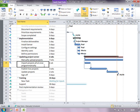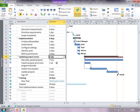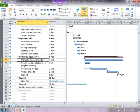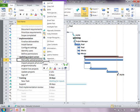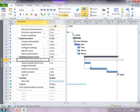Also the overall summary task duration is six weeks. If I go with manual update it is going to take seven weeks. So for the time being I right-click and I inactivate manual upload. In a moment it shows that the overall project summary for updating project server is six weeks and I can import projects all at once within one week.